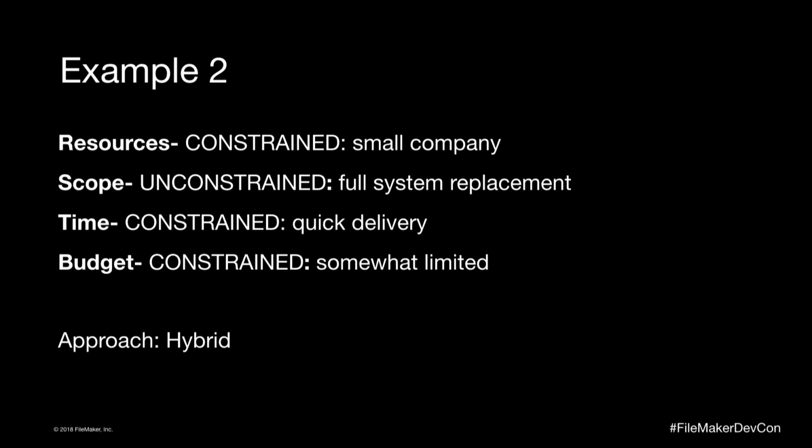So in this type of situation, because it's a full system project and we have a 6-month timeline, what I would do is gather all my requirements in a waterfall-like method. I would sit them down, I would talk to them about all the requirements that they need. I would get full sign-off with them since it is a small company and they probably don't have time to dedicate to being Agile.